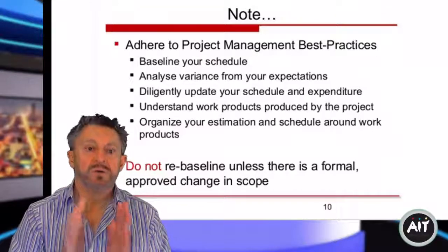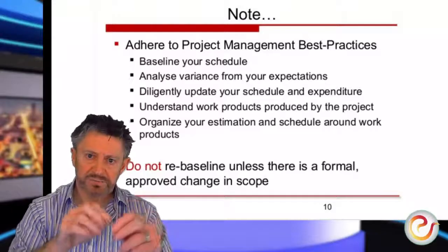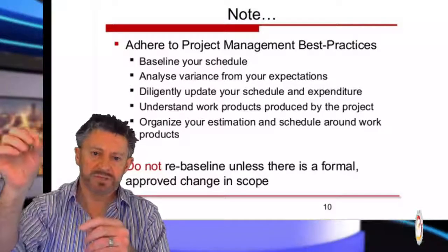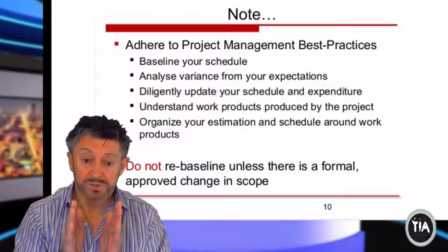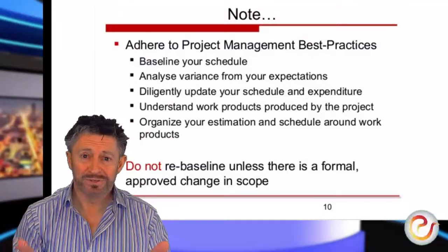And the customer says, okay, I'll pay for it. So now you change your baseline because you have additional work over a longer period of time. That's the only criterion on which you will change your baseline plan. Don't let anyone tell you otherwise.